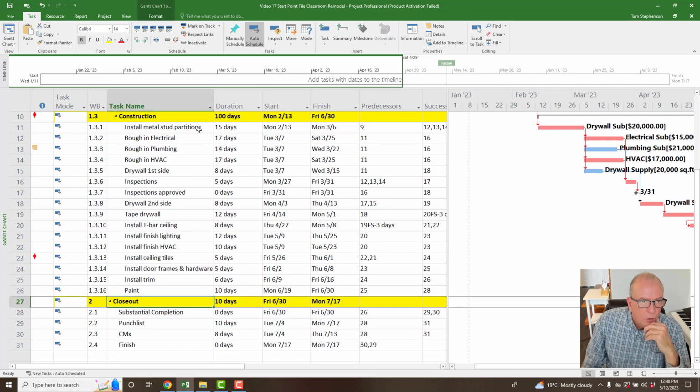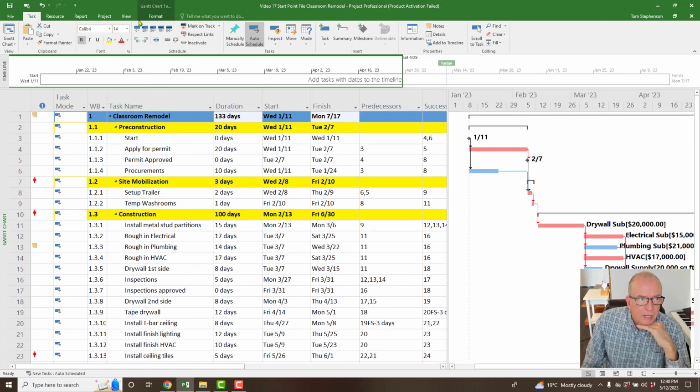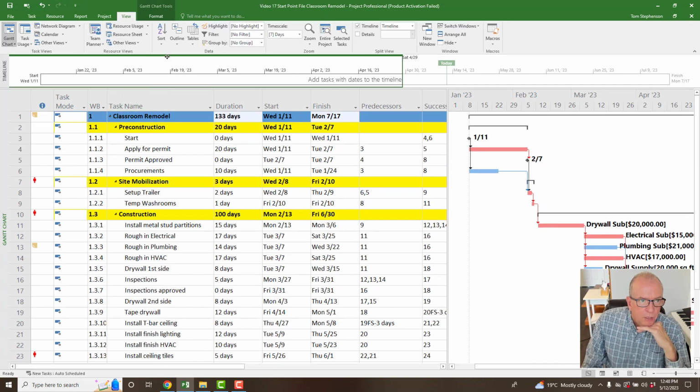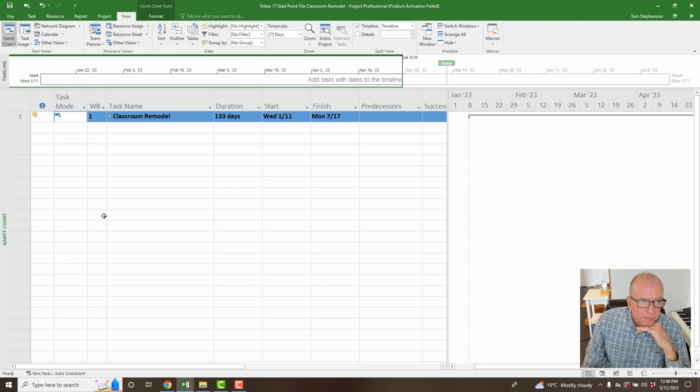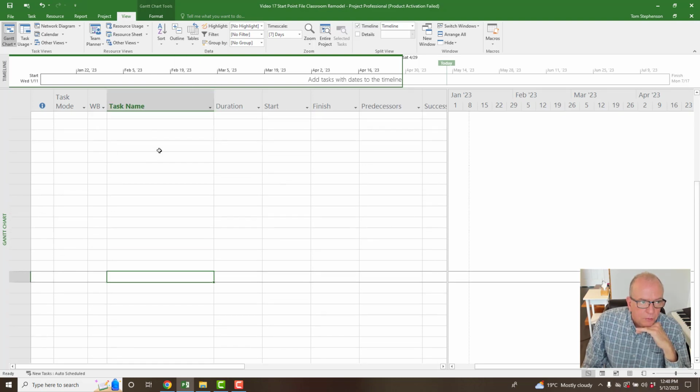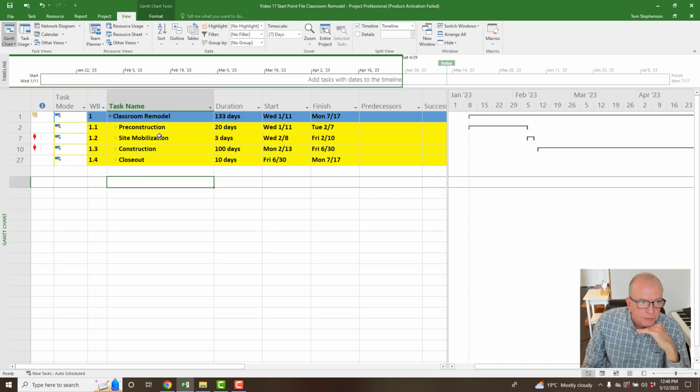So I check my work breakdown structure to make sure everything is in proper alignment. And again, as a quick check, you can go to View and look at it by level. You can go View, Outline, Level 1, and go up here, level 2, go up here, and then we can see them. Are these in the right levels for the way I want?